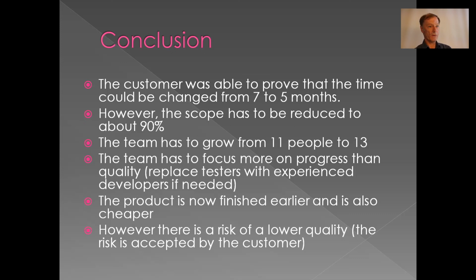And the team has to focus more on progress than quality. If this was an IT development project, you would probably replace 1 or 2 testers with 2 or 3 experienced developers. Other types of projects would do something similar. The product is now finished earlier, and it's actually also cheaper. However, there is now a risk of a lower quality, but that's accepted by the customer because they chose to do it this way. This is all very transparent.